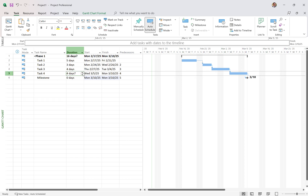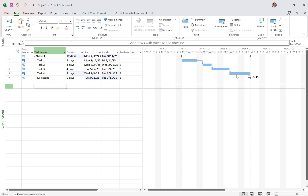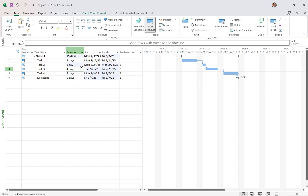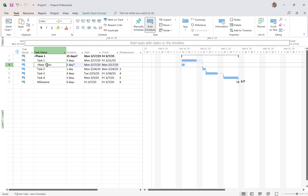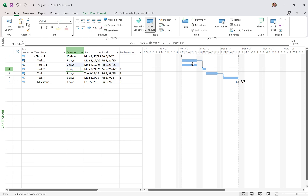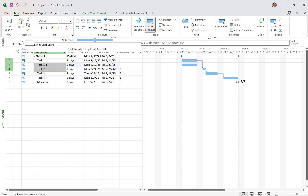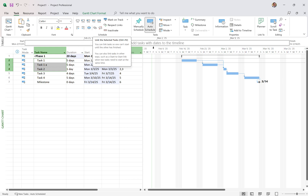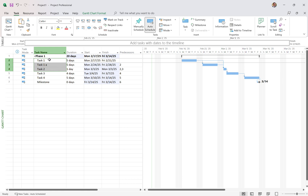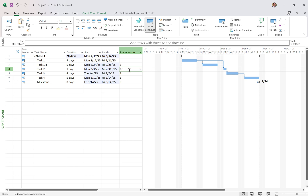Maybe I want to change that 4 days to 5 days — now we know the project is going to finish on the 11th. If we need to add a new task we hadn't previously considered, I can click Insert Task and call this Task 1A, taking 5 days. We need to add that into the linking sequence. We can break the links between the selected tasks and then relink. Be careful of double links — between Task 1 and Task 1A they're linked, but Task 2 was also linked to Task 1 as well as Task 1A. We can come into the predecessors column and set it to depend on Task 3 only to remove the double linking.